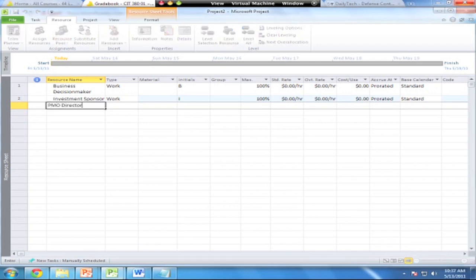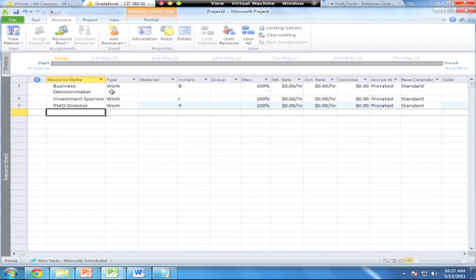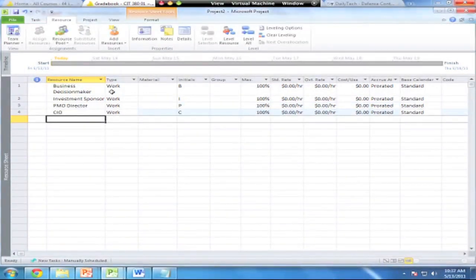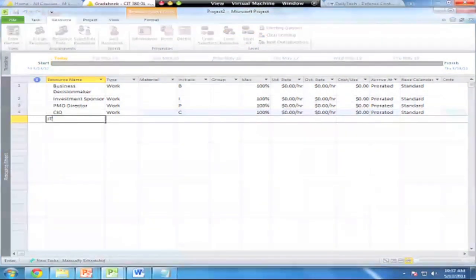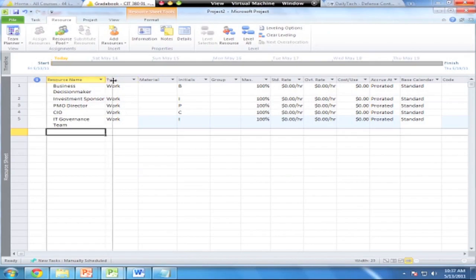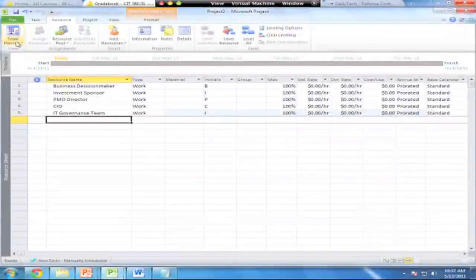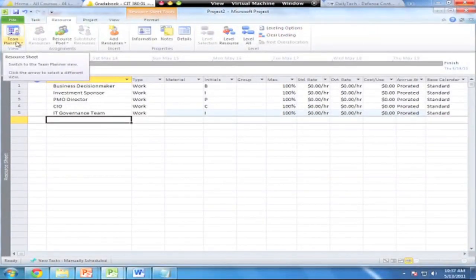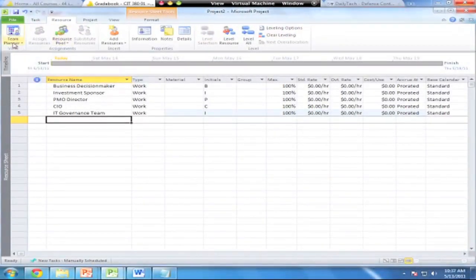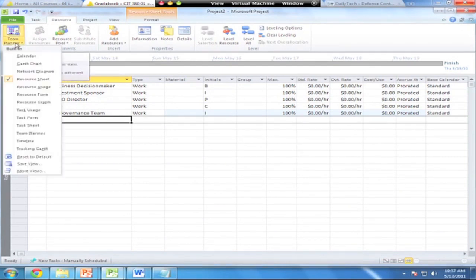Some of these resources are individual people, and sometimes you can define them as departments. For example, the IT Governance Team can be listed as a separate department. It all depends on how you want to track this — Project is flexible enough to let you go either way. Now that we've got those resources created, we can start assigning these people to tasks and see how that changes our model.